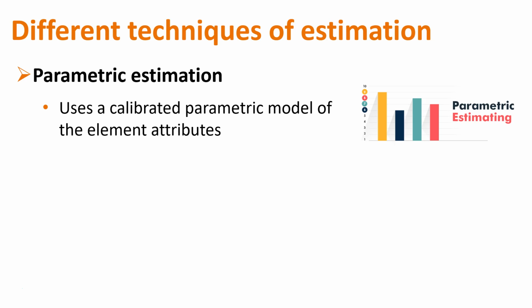That's parametric. Now you can combine parametric with voting. And voting is where people don't talk about what their estimates are. You talk about what needs to be solved, and then they secretly vote, and then they share with everybody. And then you figure out what's the range, and is it close enough? And if it's too disparate, you get the group to discuss why did you think it was only going to take 4 hours, and you think it's going to take 24 hours.